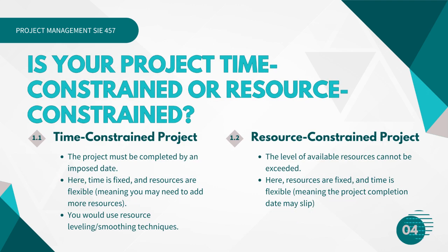So how do you choose? You need to classify your project. Is it time-constrained? This means it must be completed by an imposed date. Here, time is your fixed point, and you'll need to be flexible with resources, maybe even adding more to meet the deadline. Or, is it resource-constrained? This means the level of resources you have cannot be exceeded. In this scenario, your resources are the fixed point, and your timeline must be flexible. The project will take as long as it takes with the team you have.